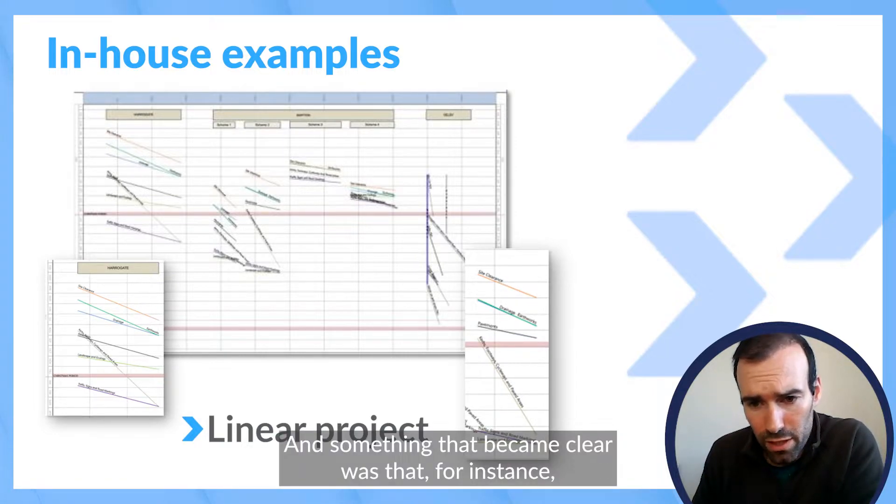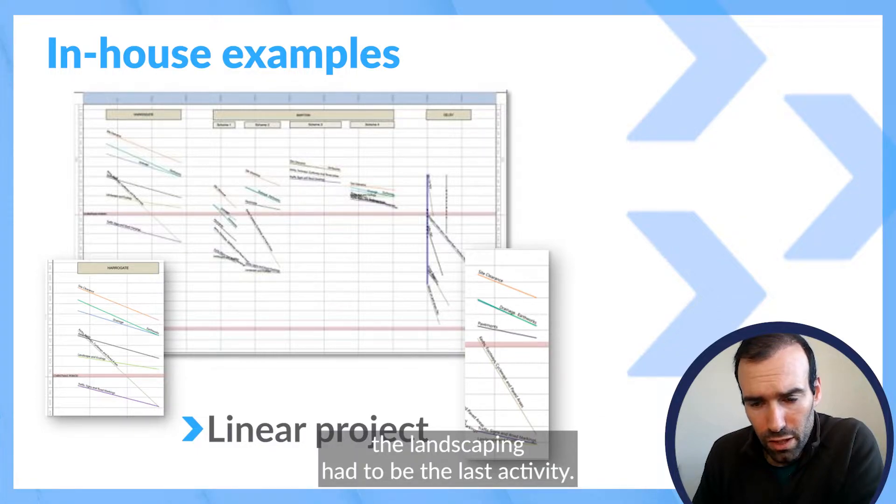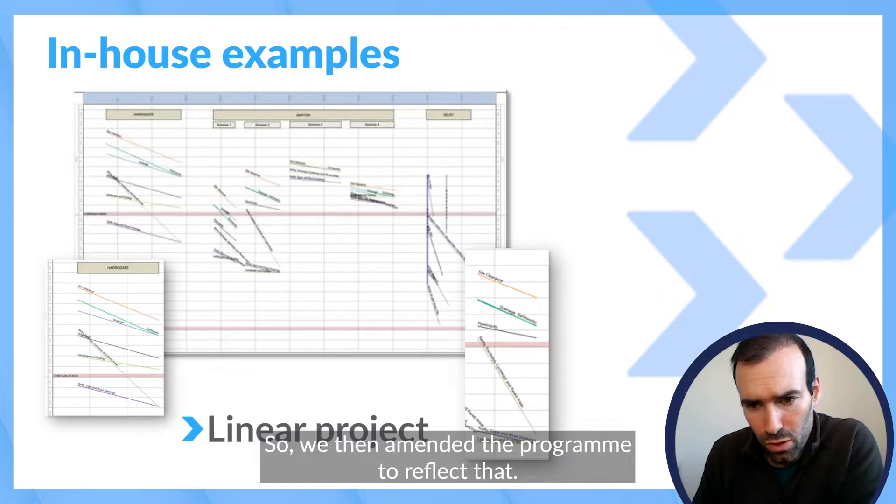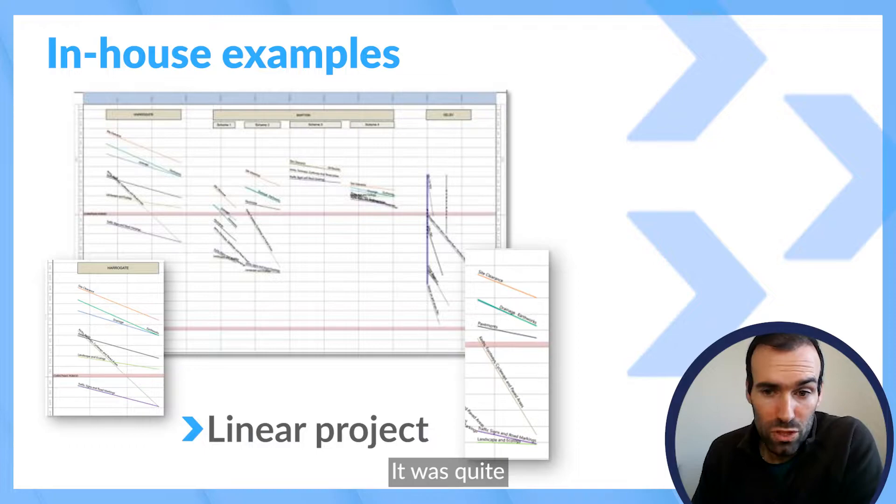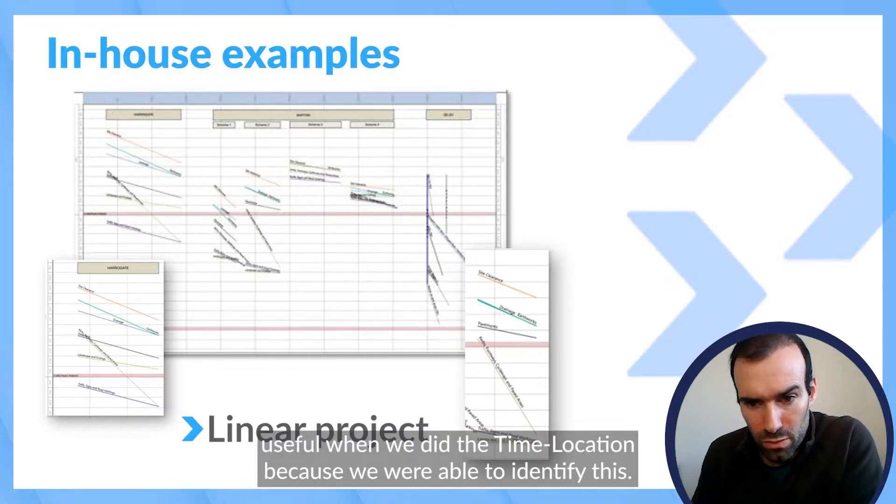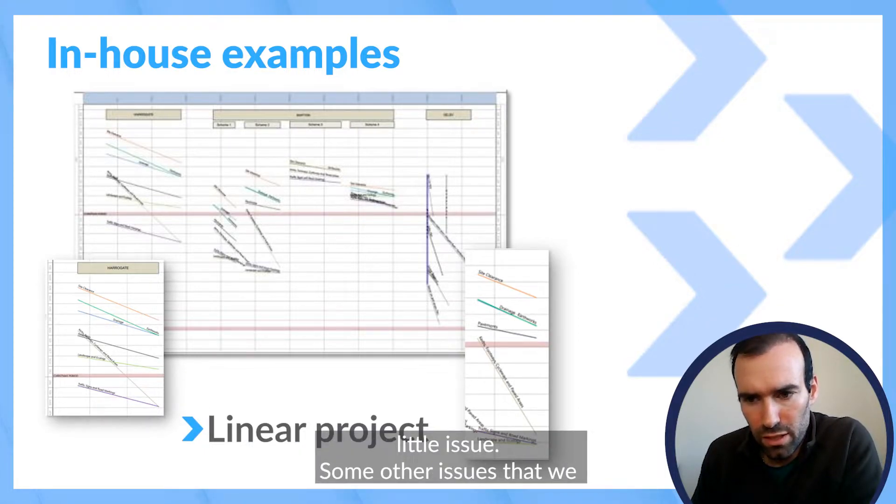And something that became clear is that we identified that, for instance, the landscaping had to be the last activity, so we then amended the program to reflect that. So it was quite useful when we did the time location because we were able to identify this little issue.